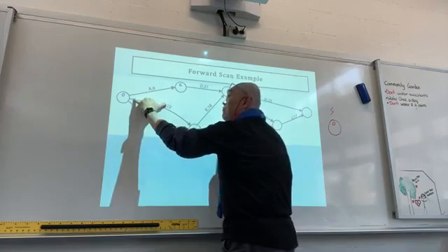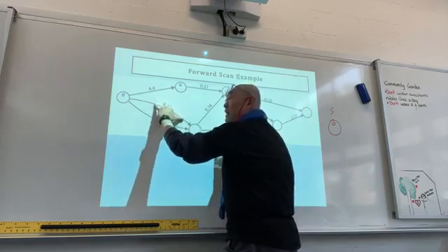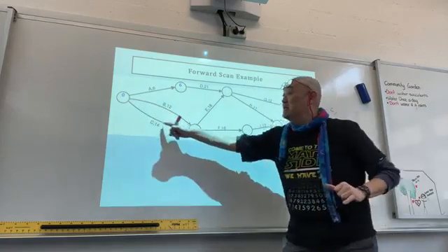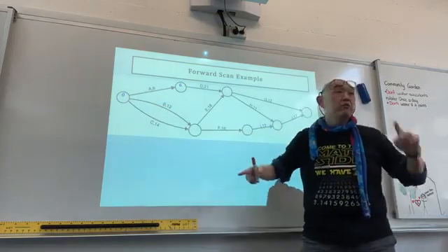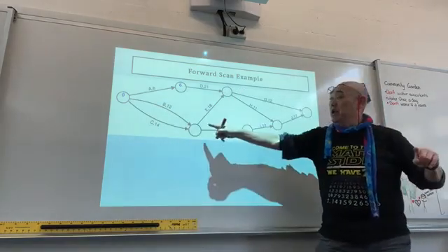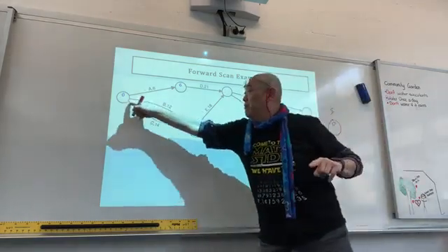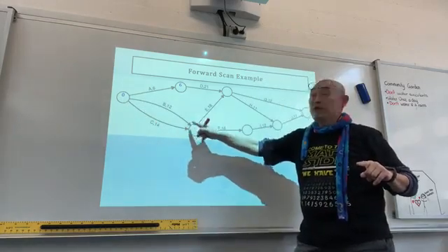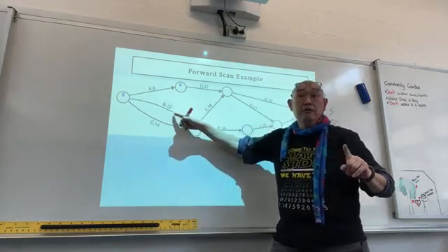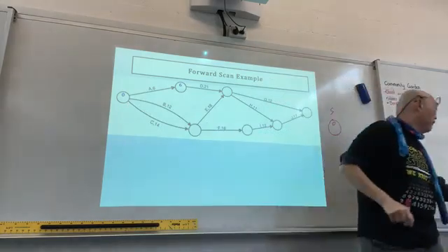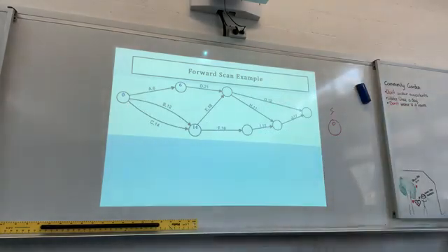You can move B a little bit later, whereas C, which is 14, you must start straight away, and it will take 14 minutes to finish, whereas B is 12 minutes. So therefore, you write the 14 there. If 2 things are going into one, you have to think about what is the maximum. The largest number goes in.